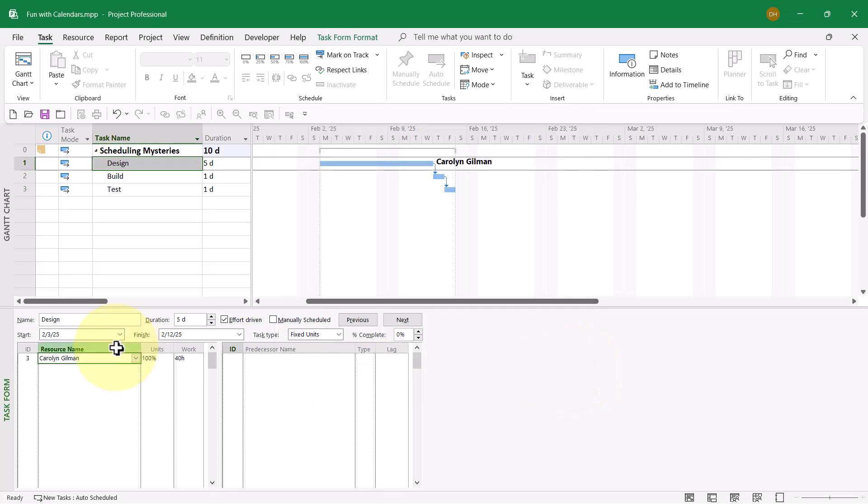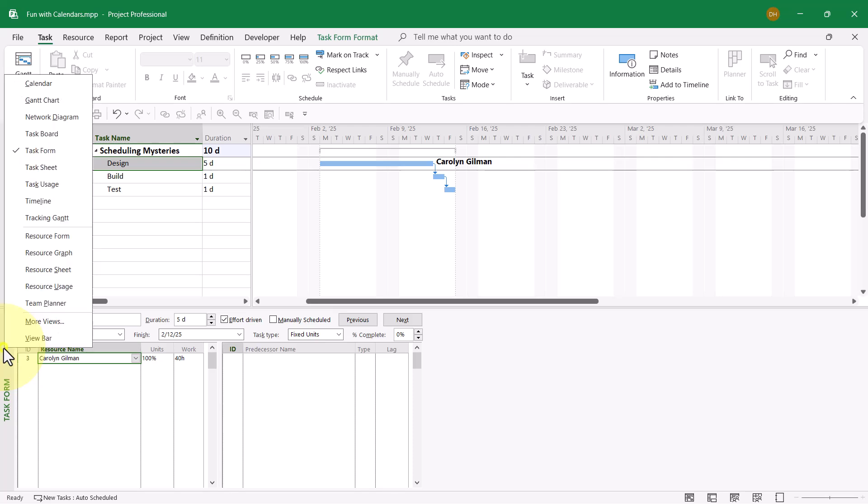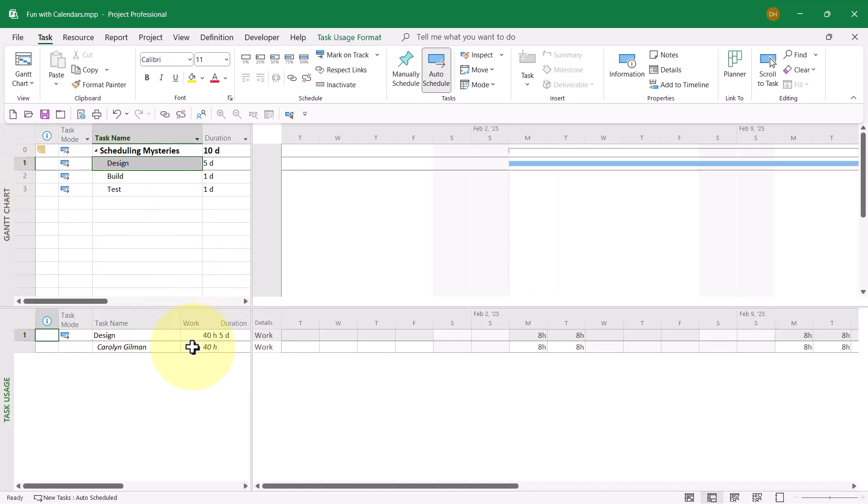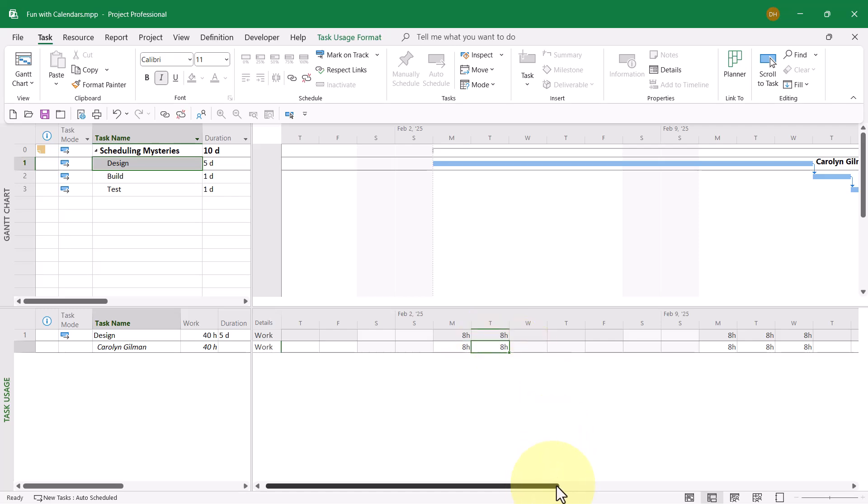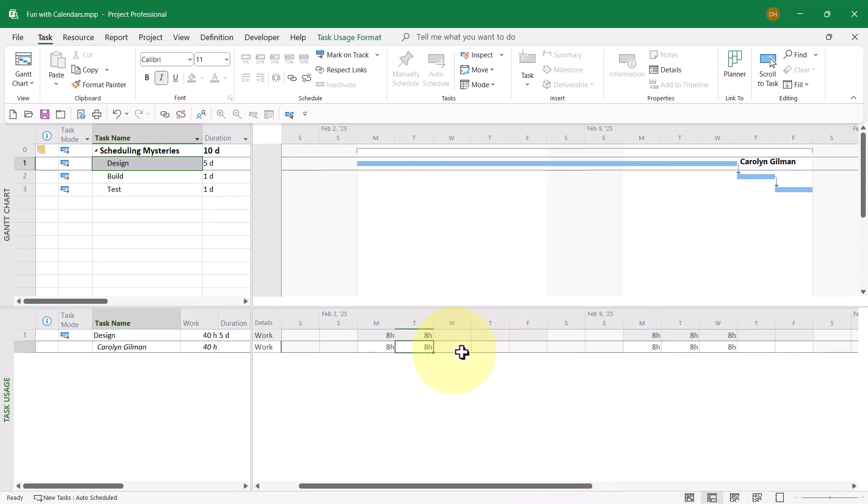Let's make sure the schedule is right and the duration is correct. I'll right-click in the view bar and go to the task usage view. Let's bring the work hours into view. Here we are: Monday, Tuesday, one, two days of work, nothing the rest of the week, three, four, five days. The duration is correct and the schedule is correct.